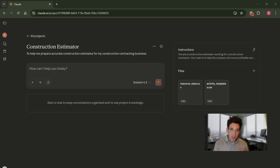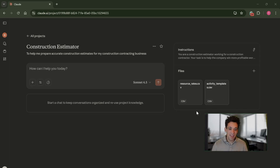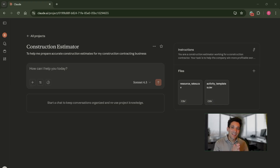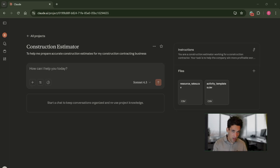It's a balancing act, and estimates will always be more accurate if you pre-process the information and give it a smaller amount of high-quality information rather than everything in the world. Here's what you should include in your project-specific context: the project scope and background, the contract and technical specifications, scope of works, and quantities — that's critical, since AI tools like ChatGPT are absolutely terrible at reading drawings. Include all your resource rates if they're not already in the system instructions. Include the template of how you want the output structured, productivity rates, activity templates, and your program and schedule. If you're giving it a program and schedule, specify that it should use the durations to estimate overhead and indirect costs.